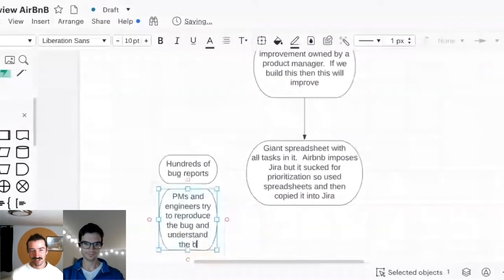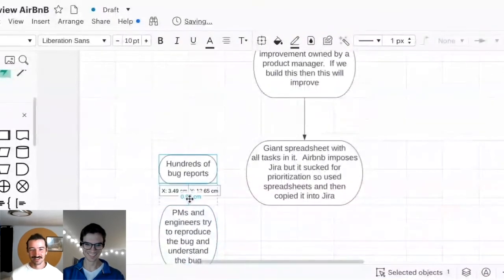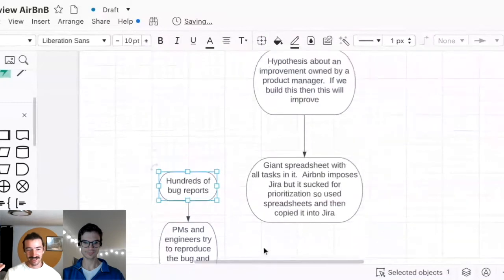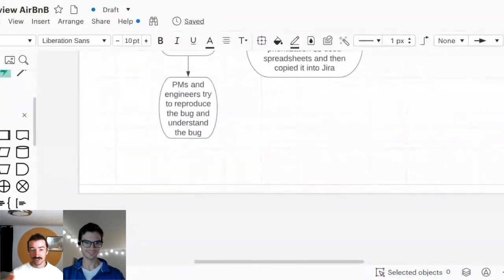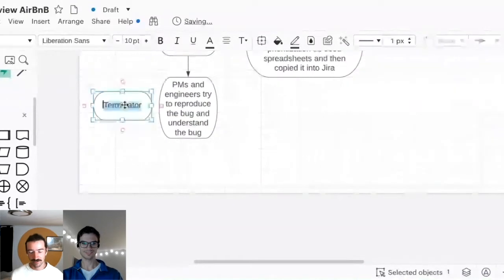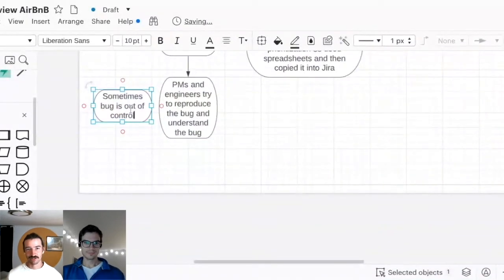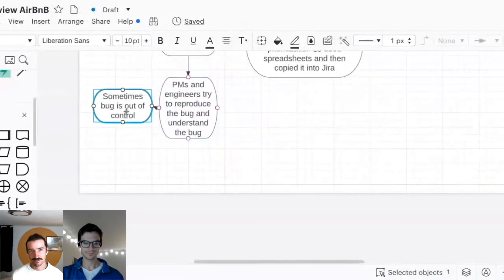Like I don't have a Japanese credit card, and it is a lot of work for me to get one. Bugs might also be totally out of our control. Maybe the Japanese credit card processor was down that day. So just reproducing and triaging bugs is an enormous amount of work. And then fixing them can also be very difficult, obviously. So we don't track bugs in this spreadsheet. We would dedicate, I think, 2 weeks every quarter to just bugs.